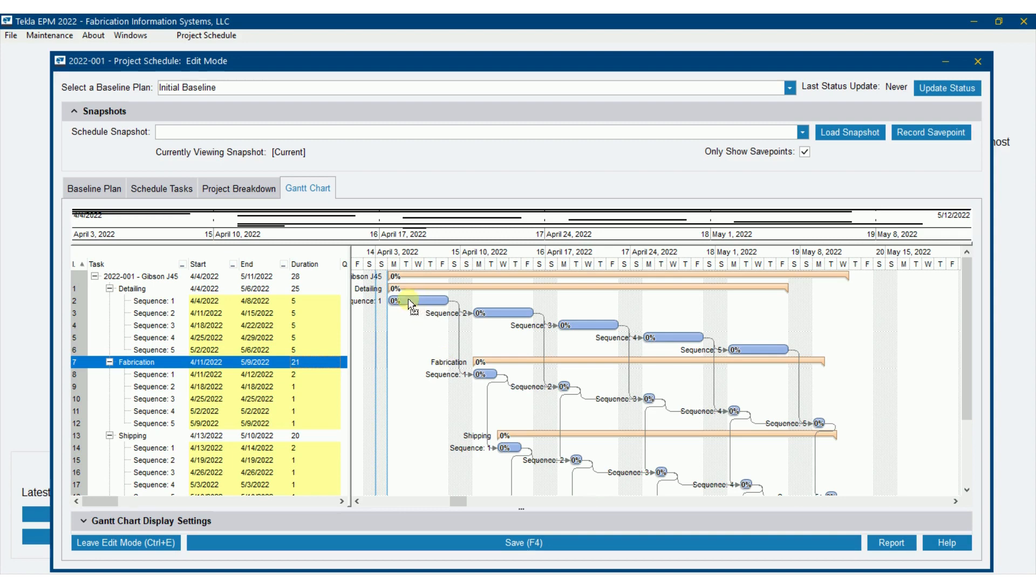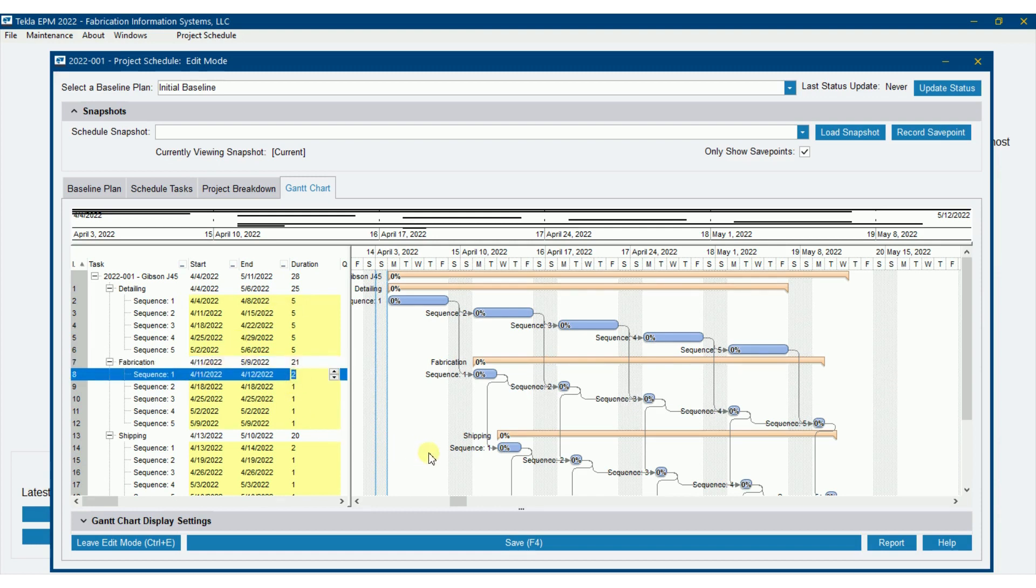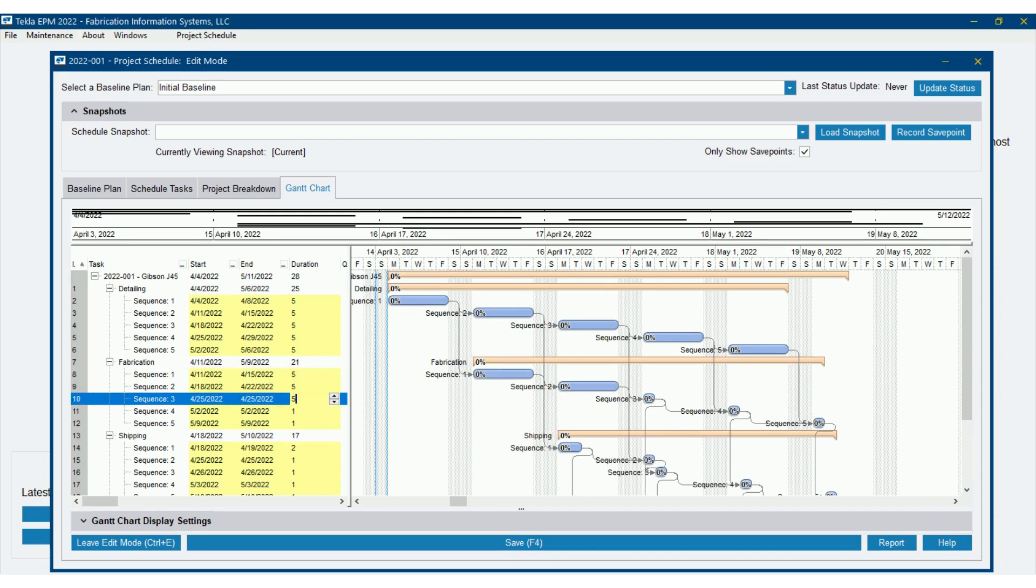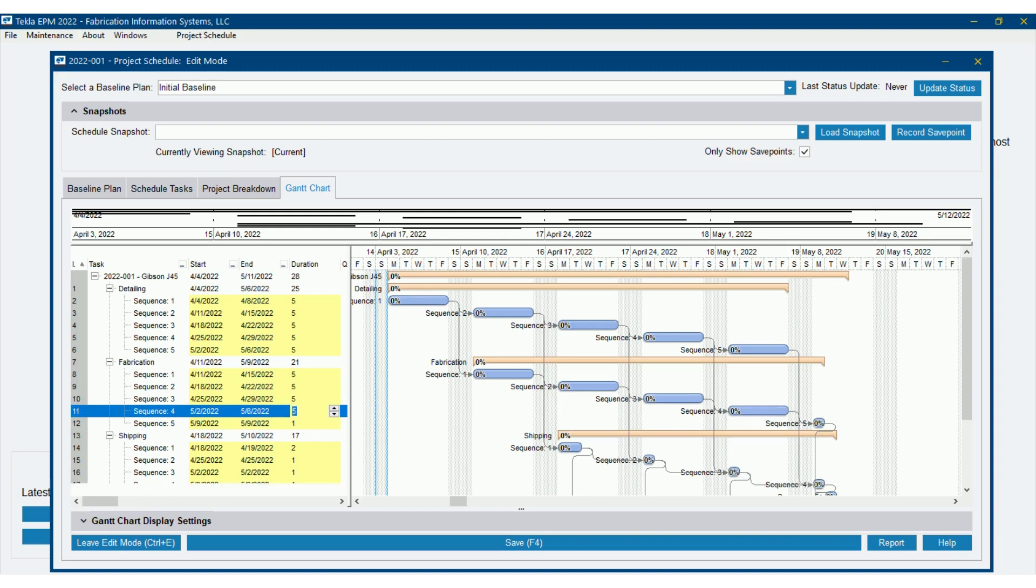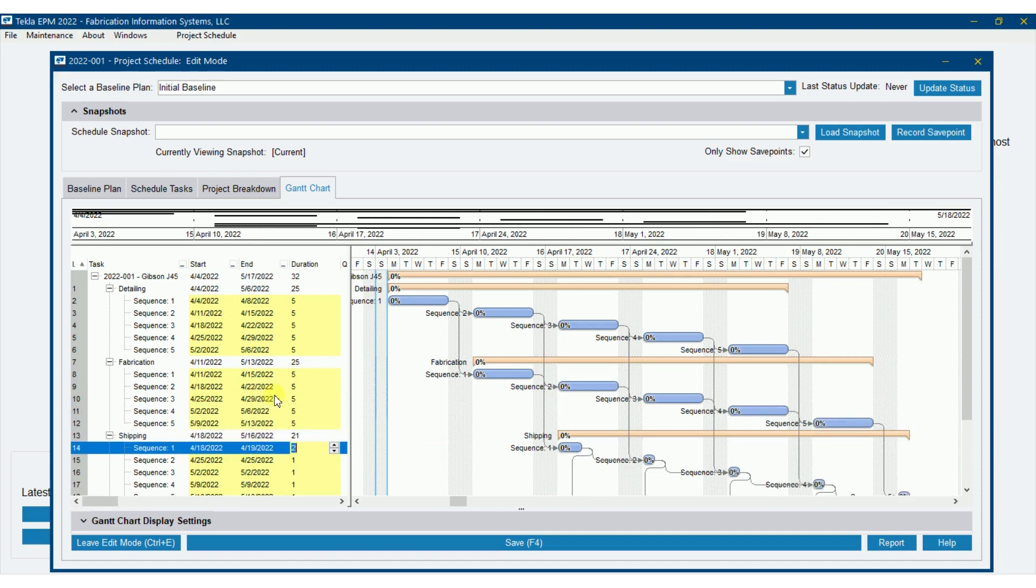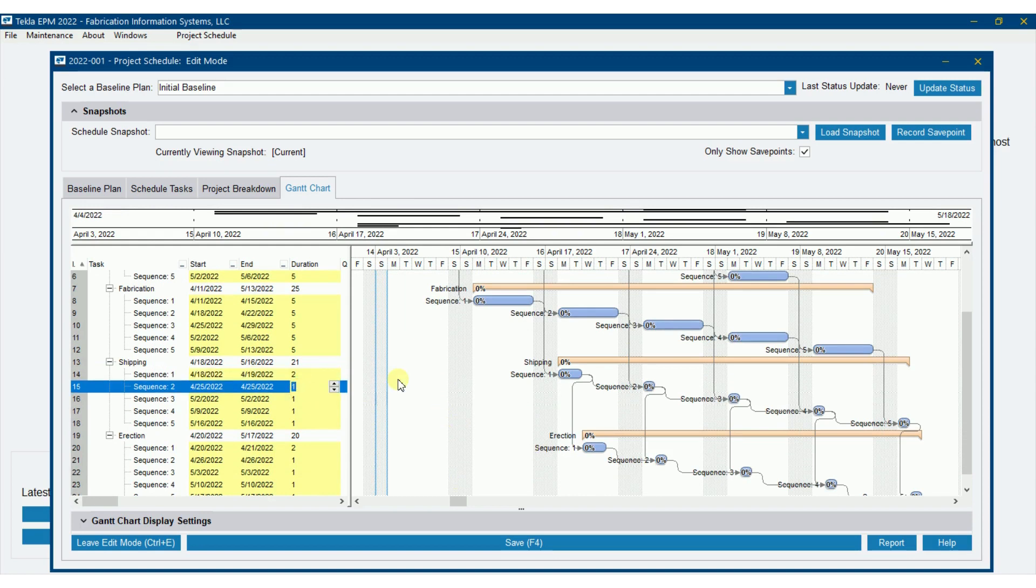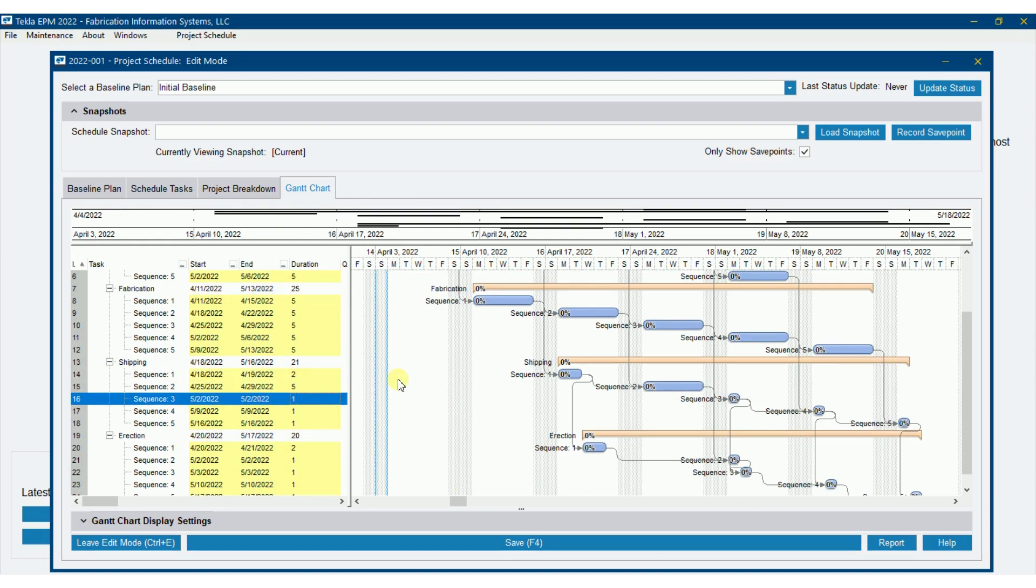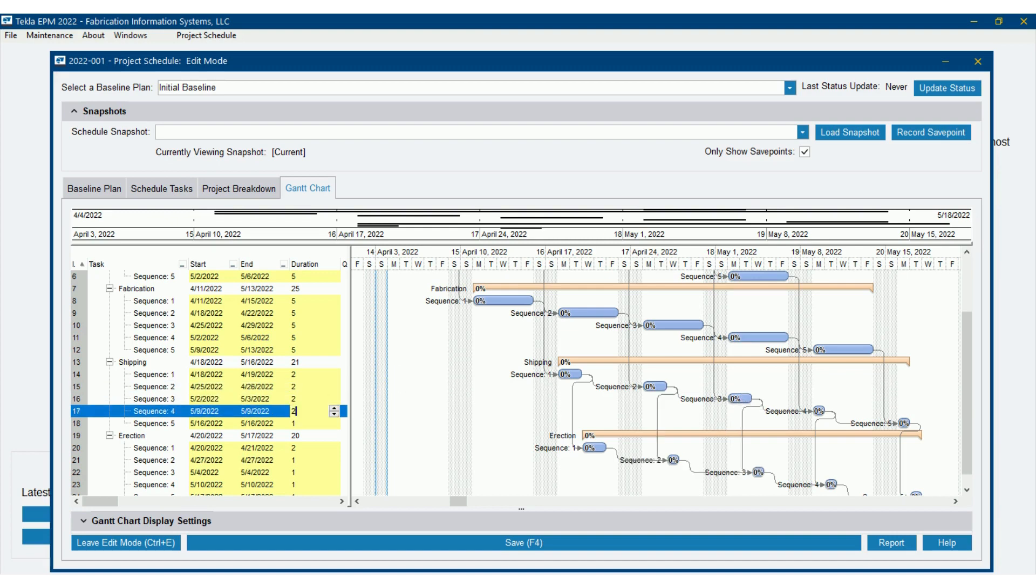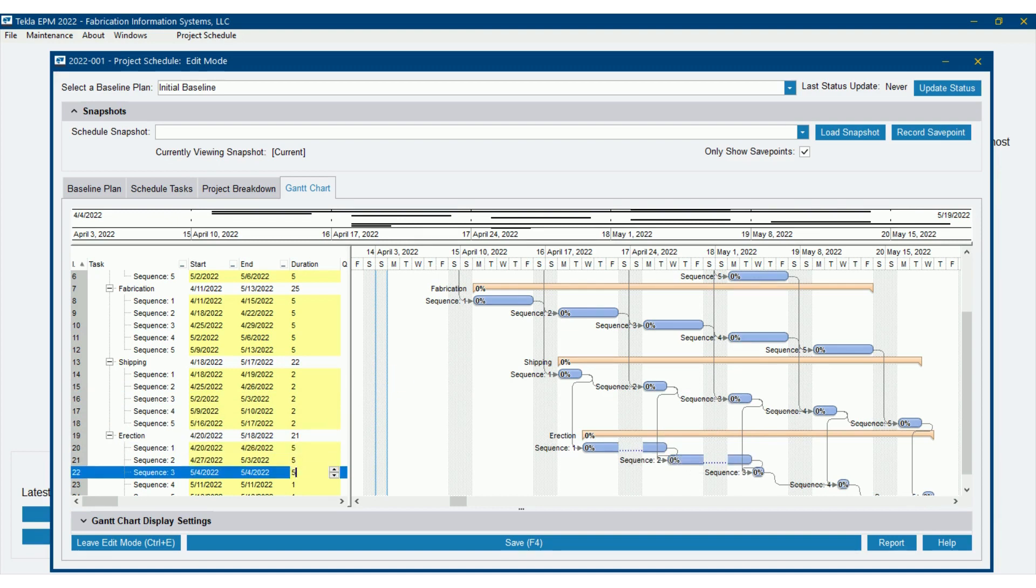So everything's pushing out. Fabrication of sequence one right now is planned to start on April the 11th, which that's a quick approval process, but that's what we're saying. It's going to take five days. And then for fabrication, we're going to have five days for each of these as well. I can just change the dates if I wanted to. I'm going to change the actual duration here since I have my links set up. We'll just say shipping is going to take two days here.